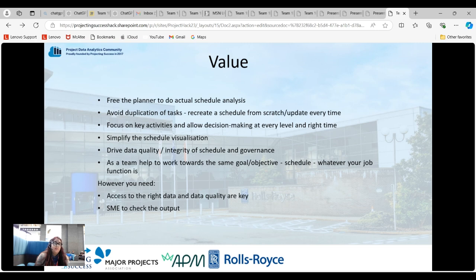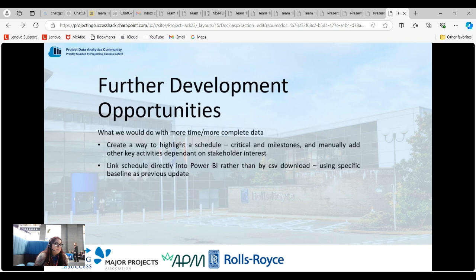Looking beyond what we have produced, we would recommend utilising a fuller data set and ensuring that the industry standards are being followed, such as not duplicating task names, but using number delimitations for various versions of similar tasks. We cannot rule out that missing information from the dataset is because this isn't collected. Therefore, the levels of tasks that are recorded may need to be reviewed to ensure that these are being captured.